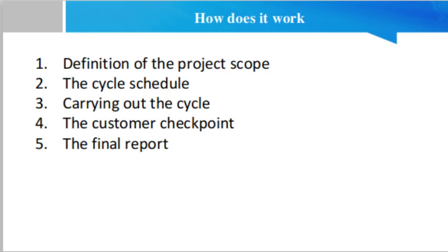The customer checkpoint - this is an essential step in the AFP method. The client reviews the quality of what has been delivered during this cycle. Together with the project manager, they plan any corrections or improvements to be made in the next iteration. From there, the process repeats itself: planning, execution, and verification, until the project is completed.